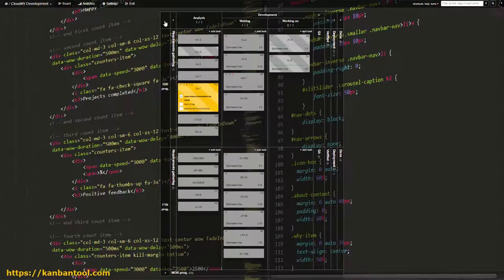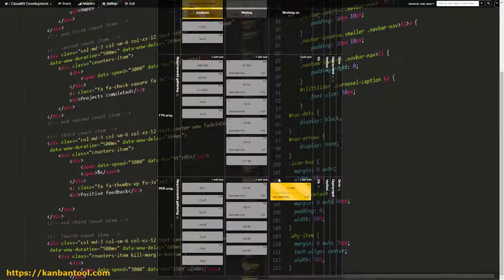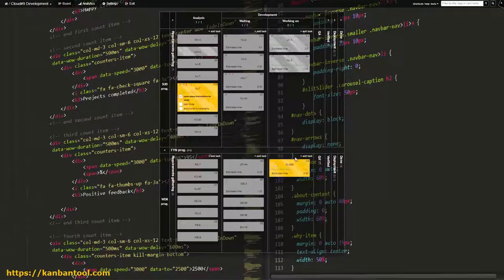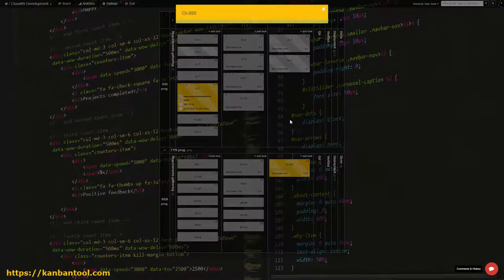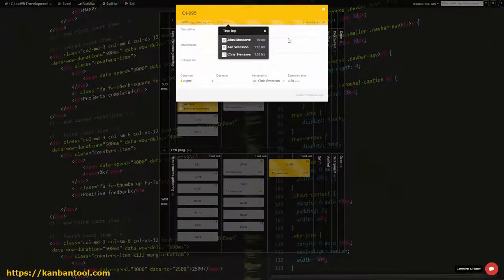Modules and features are queued up in Waiting and assigned to specific team members. As developers become available, they pick tasks from Waiting and place them in Working On.